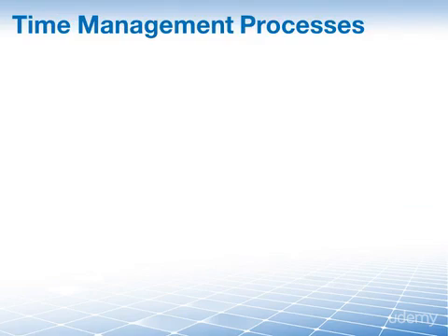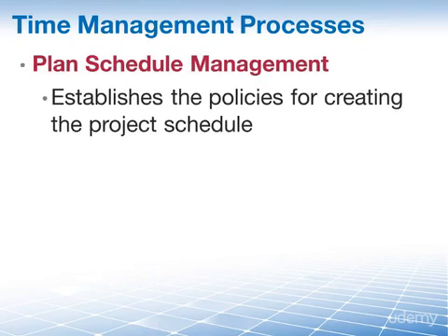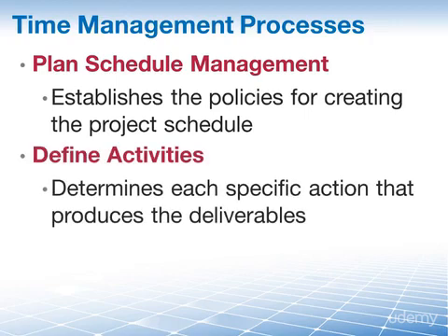Remember, we're looking at develop schedule in this lesson, so everything that happens before we get to that 6th process leads up to that 6th process. It all begins with plan schedule management. This is the process of establishing the policies, procedures, and documentation for planning, developing, managing, executing, and controlling the project schedule. In this process, we will, for instance, plan what scheduling tool we will be using later on in the develop schedule process.